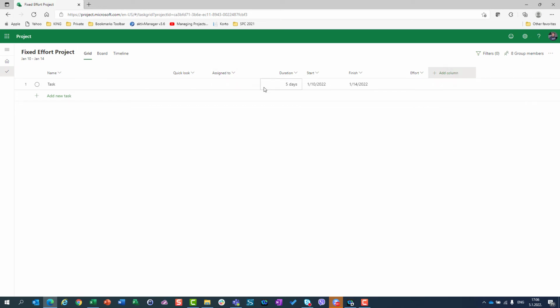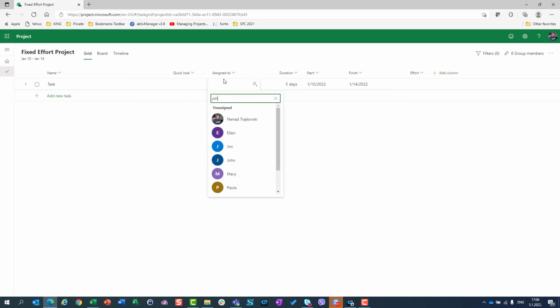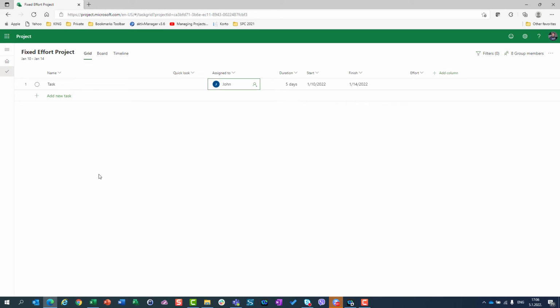Okay, add, and if I assign John here, I will first of all get the same result. 5 days multiplied by 8 hours is 40 hours. Now, since this is a fixed effort project, this task results in 40 hours. So if I put here, let's say 4 days, hours are not going to be changed. So in that case, John will work 40 hours in 4 days.